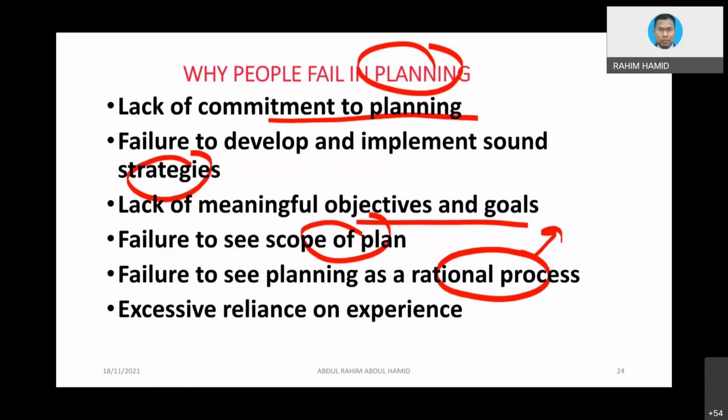And if you fail to do so, and if you fail to incorporate that thing into your planning, and you fail to put the cost of what we call a temporary access road, then you are going to have difficulties, because maybe you already planned for the activities. That should be okay, but in order to construct a temporary road, it might take a few months.